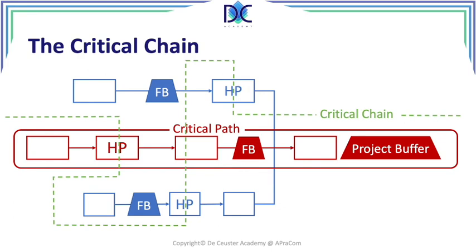The project buffer is also very interesting. When we have delays on the project, we communicate the project buffer to the customer, and as long as we still have buffer, we don't have to report any delays to the customer. So we don't have all that stress related to the end time, the duration of the project.